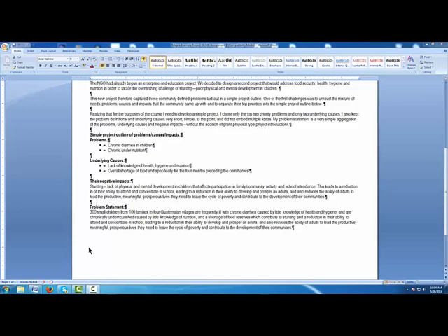This is very important for the simple reason that if your project outline is a little different than your logical framework, which is a little different than your budget, which is a little different than your schedule, then all of the people working in different functions on your team, such as project managers, field staff, and bookkeepers, will each be working on slightly different projects if each one of their management documents are different. You want everybody to be working on the same project by using absolutely parallel documents.